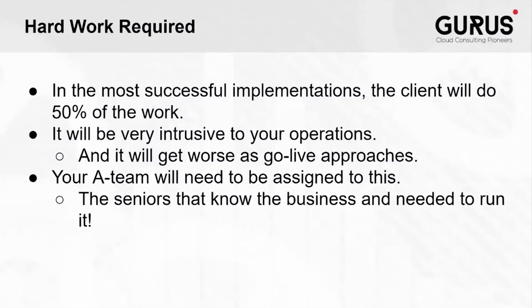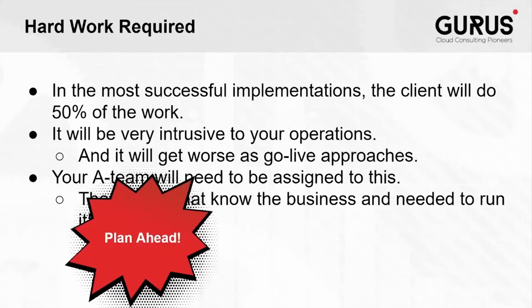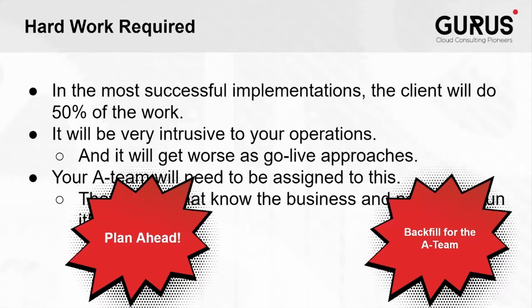There's no escaping that most successful implementations require hard work, and this can often mean taking on 50% of the work within your key process owners within the project. You can expect this project to disrupt daily operations, especially as you approach go live, and preparation is essential to success. Keep in mind that those key process owners should be your A team, those who know the business and are required to run it, so that high-impact decisions can be made in a timely and effective manner. The key takeaways here are to plan ahead for disruptions and to backfill for your A team so that operations can continue with as little disruption as possible.